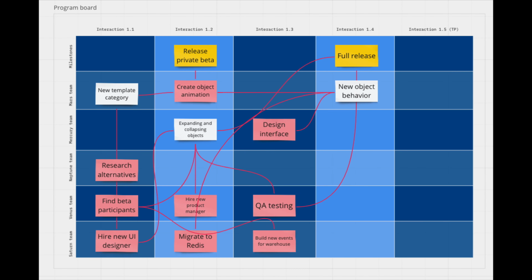You want to track their dependencies, and you might want to make that visual. So again, a Miro board is a really good place for this, or even your product backlog in Jira is another place where you can track it. Miro board has a whole dependency template that it has created for SAFe PI planning that you can use, where you can use a visual way of tracking dependencies if you have loads of them with multiple teams. And in your Jira backlog, you can track the user stories by putting in dependencies between them, and you can create a dummy user story if you want to track those as well.